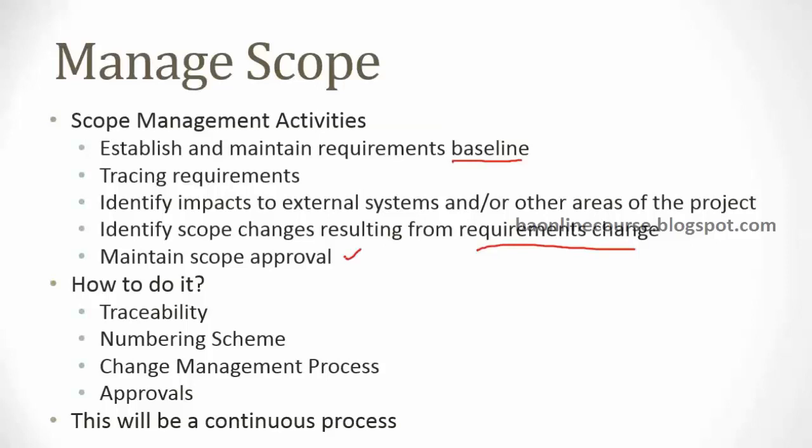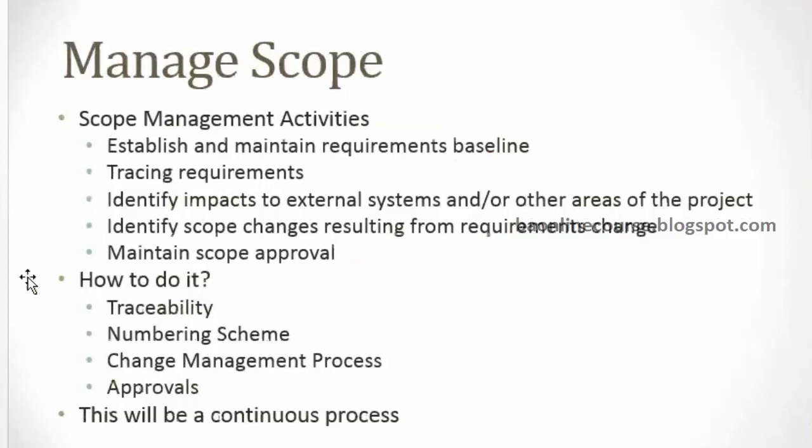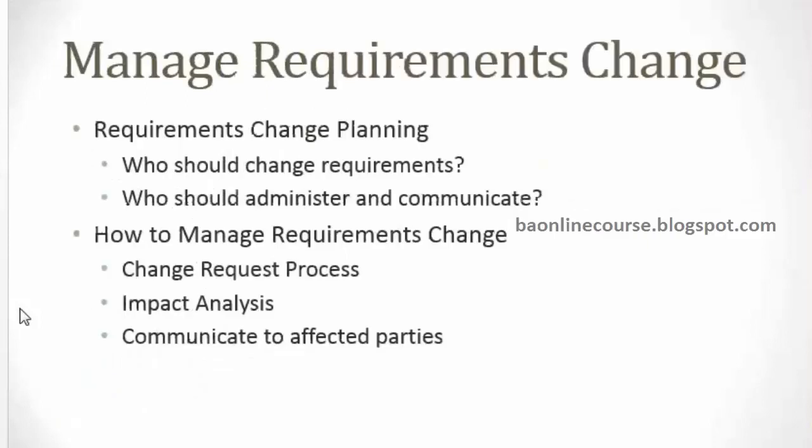In fact, in most of the projects, this would be a definite checklist item, an exit criteria for your requirements. Getting the approval is an exit criteria. Unless you do this, you cannot start the design activity. Some organizations enforce it as a policy, but even if it's not done, make sure that you take that approval. Okay. So that's on scope and scope management. We still have to look at the traceability and then the change management.